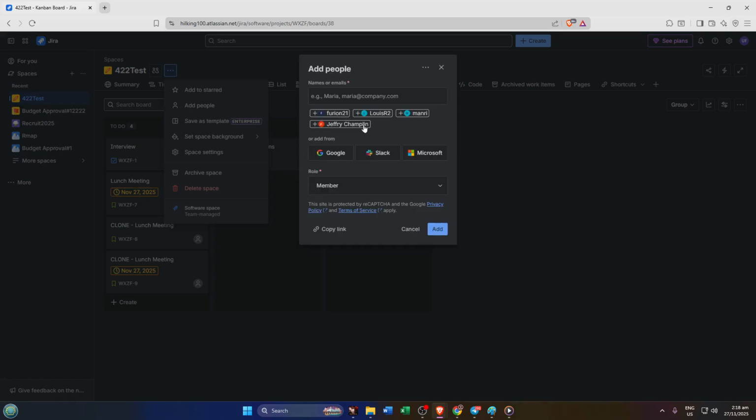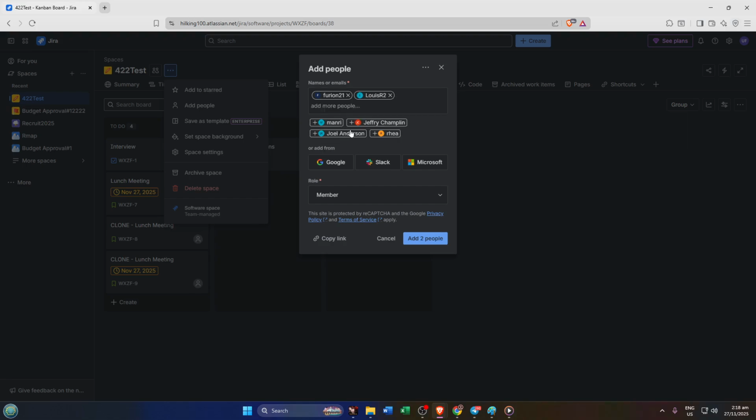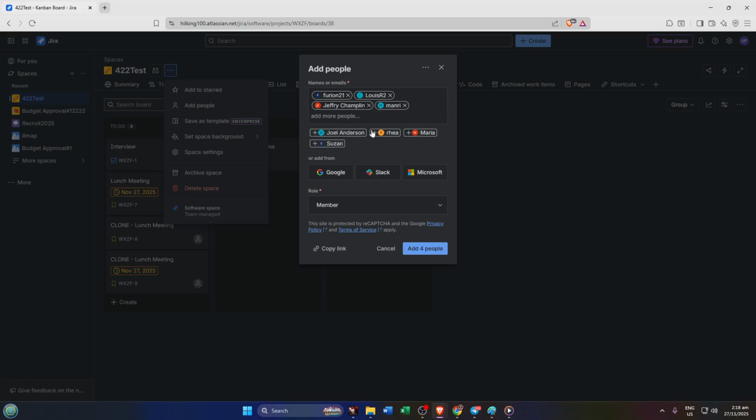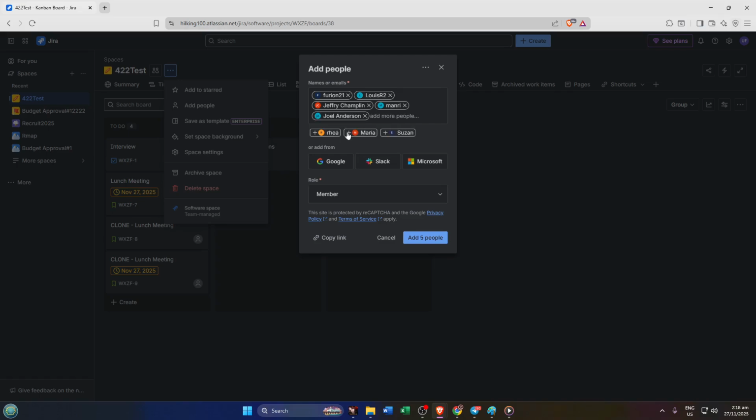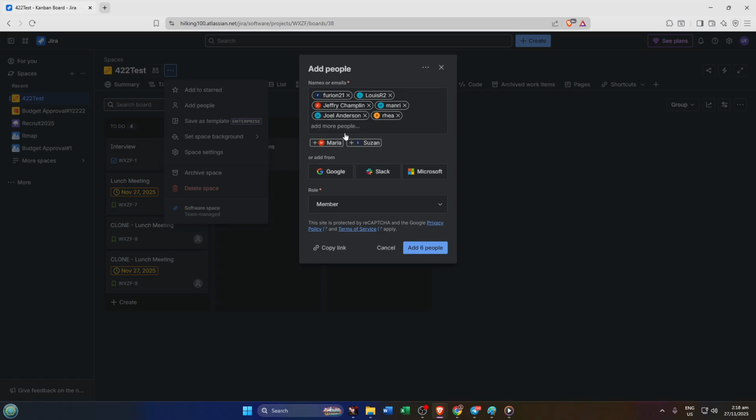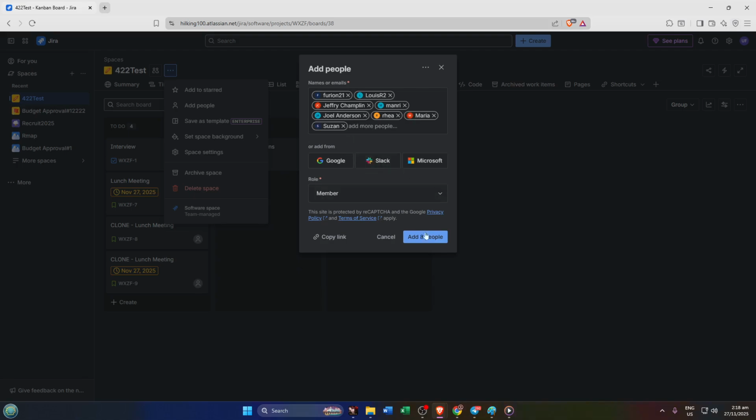You can stop here, but I recommend you spend a few minutes exploring project configuration. On the left-hand navigation menu, dive into project settings. Here, you can enable or disable features to match your team's style, like adding a backlog for sprint planning, turning on reports for easy progress tracking, or creating custom issue types and workflows that fit your process. The great thing is, these settings only affect this project, not your whole Jira instance. So don't be afraid to experiment. Your changes won't break anything elsewhere.